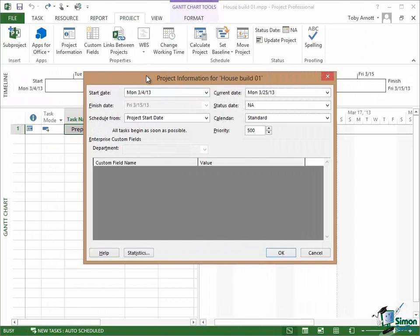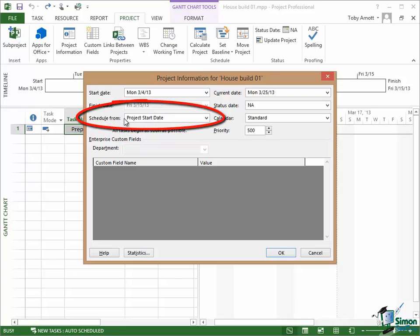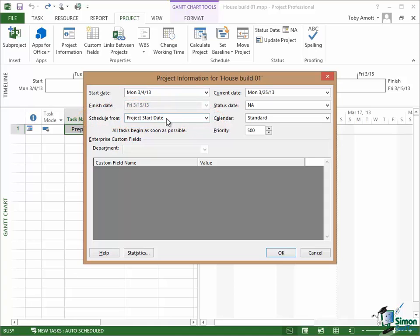So if we were building a house and we had a start date of March 4th, the chances are that our objective would be to finish building the house as soon as possible. One of the things that we would be using Microsoft Project for would be to help us to schedule the work on building the house which would enable us to finish as quickly as possible, get the house on the market, sell it, get the money for it. However, that's not the only sort of project scheduling requirement and if you just go down a couple of controls, you find one that says Schedule from Project Start Date. You'll use this a lot. You're saying start on March 4th, do the scheduling from the start date, and get it finished as quickly as possible.